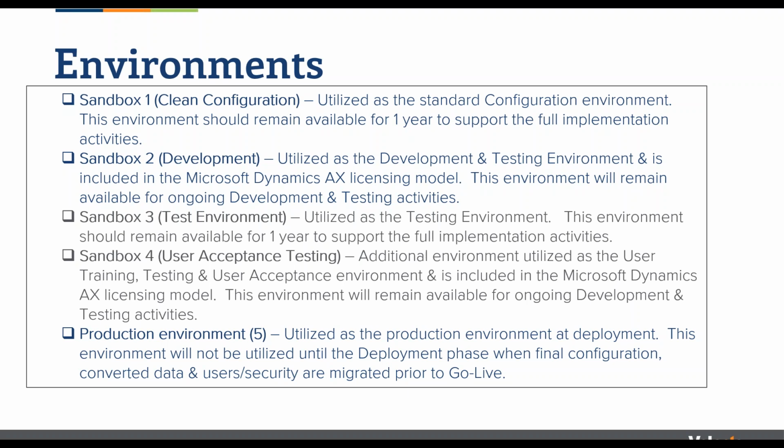For clarity, Microsoft provides 3 environments with their licensing, and so the 2 additional environments that you see here are an additional cost on the project, but once the implementation is stable, typically we can shut them down, so it's not a permanent cost, it's just during the implementation.